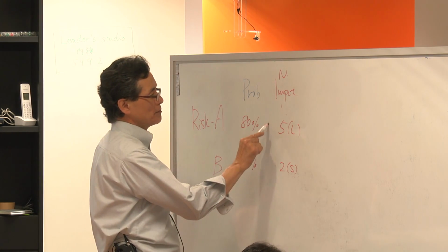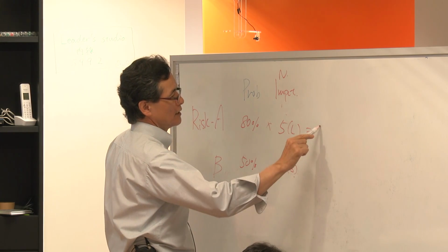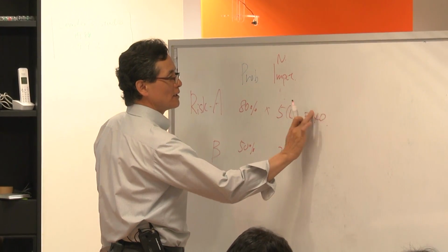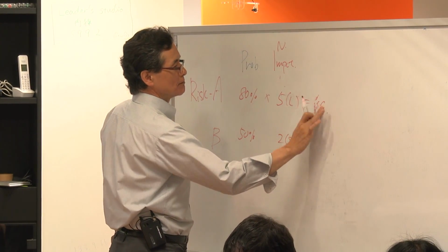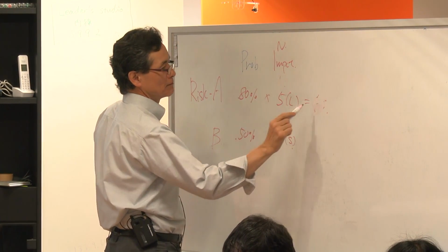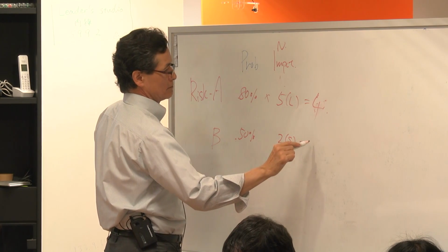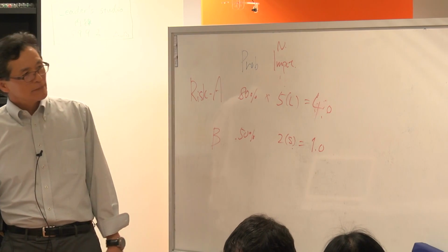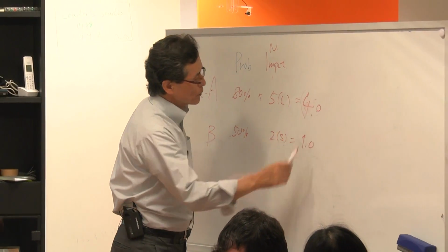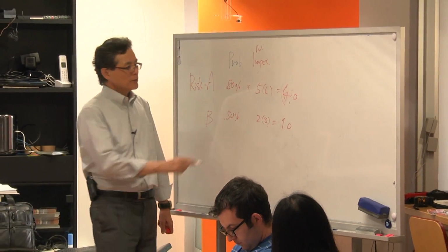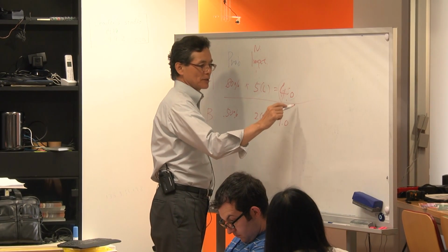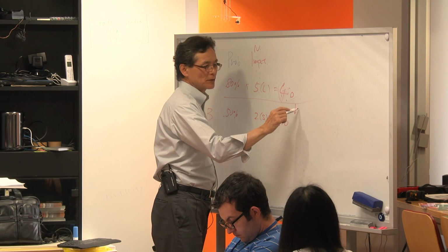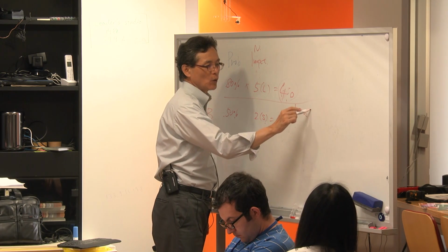So you can multiply. Let's say score 40, no, 400. So you can see it in a quantitative way. So you can put a threshold. Let's say you can elect to forget about those below 3 or 2.